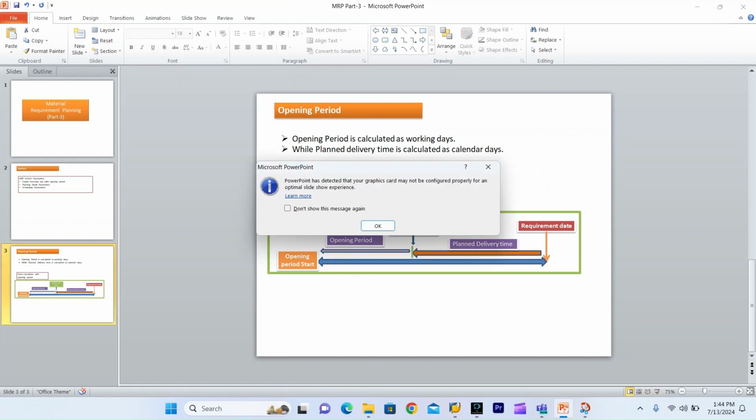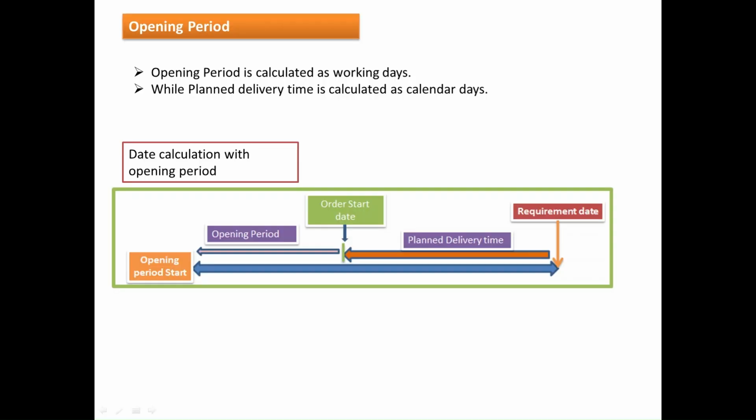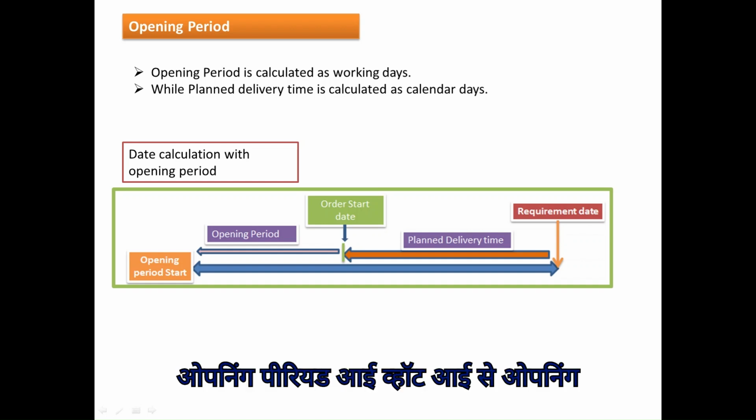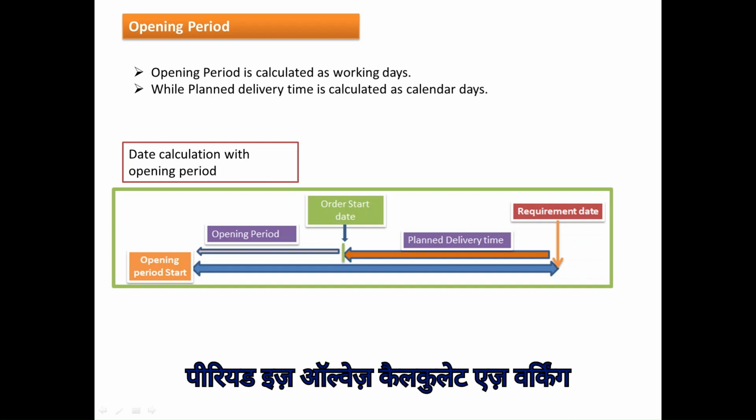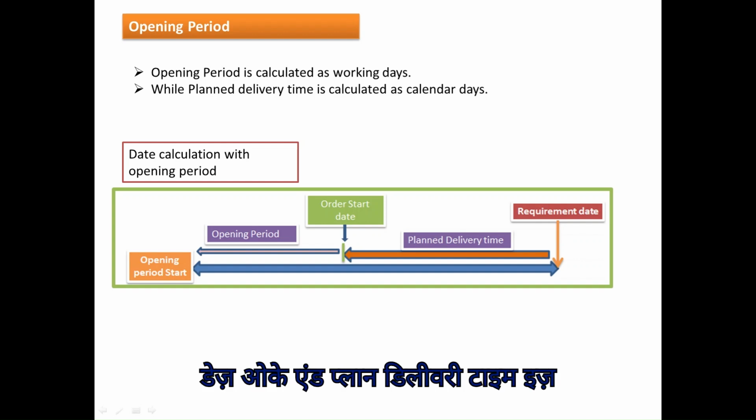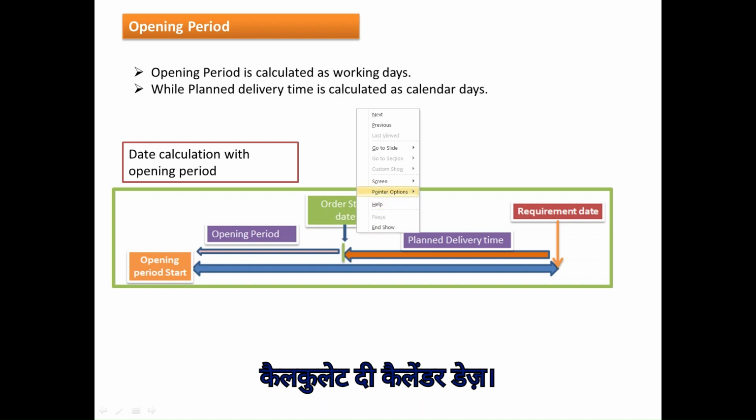See, here, the opening period is always calculated in working days. And planned delivery time is calculated in calendar days.